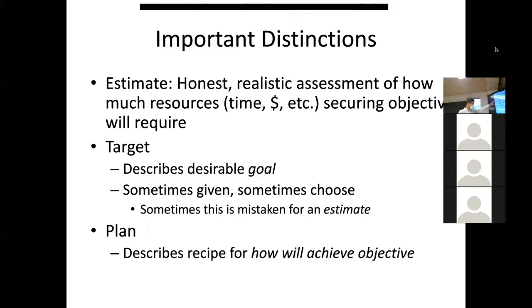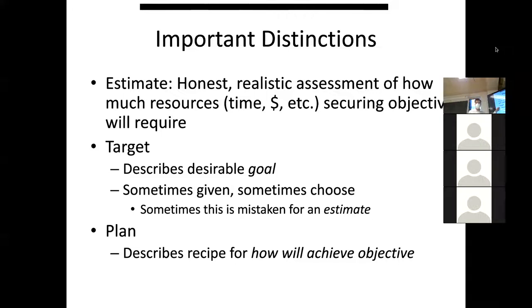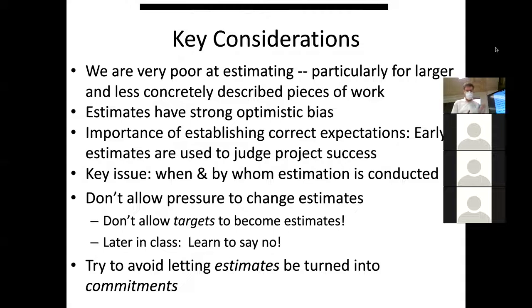A target is something you're shooting for — maybe an aspirational goal. 'We'll try to pull this together by the Christmas season' — it's a desirable goal, not an estimate. It's different from saying it's what you think will definitely happen. And finally there's a distinction from a plan, which is a recipe for how to achieve the goal: how we're going to break down the work.